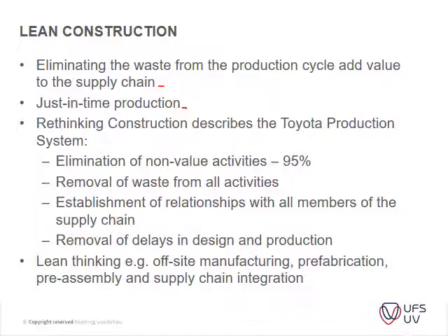It also means that the risk is transferred to the supplier and the transport thereof. Obviously, it's not always that practical, especially if you've got lead times from different suppliers and you do not know whether they're going to have enough stock within a month or two. It might be a challenge to order or to manage this. One way of overcoming this is to order material that sits in their storerooms and that they only deliver a day or two before the time. But another risk is whether you are on time to actually install the items.